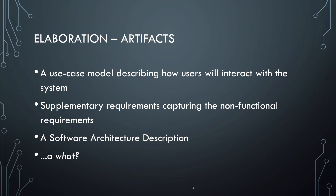The elaboration phase also results in artifacts. You need to produce a use case model that describes in more detail how users will interact with the system. You may need to describe extra non-functional requirements — for example, you want the assignment submission system to work flawlessly even if tens of thousands of students are using it at the same time, or you want to ensure that the system is online 99% of the time. Finally, the architecture of the software should be well defined at this point.